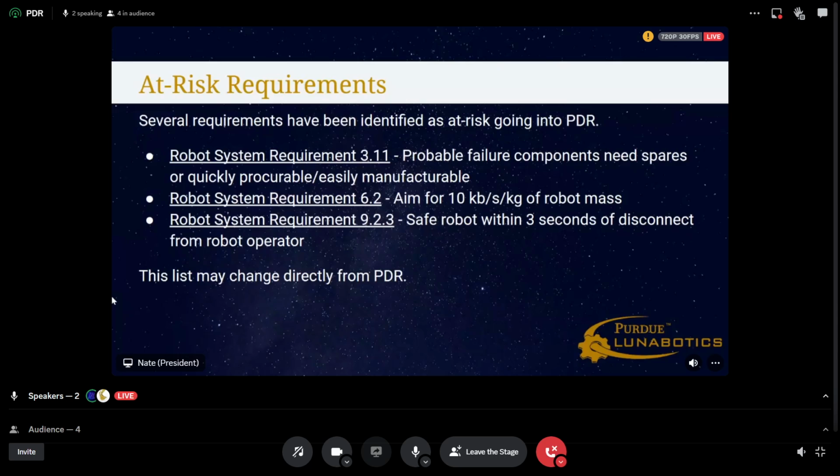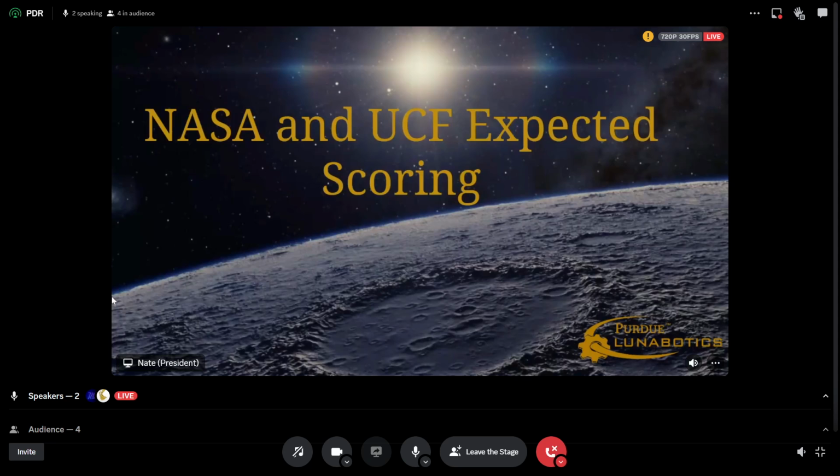If it's over 250, we cannot go into CDR with that. So it needs to be below 250 by the time CDR comes around. Yeah. Awesome. Thank you very much, Max.